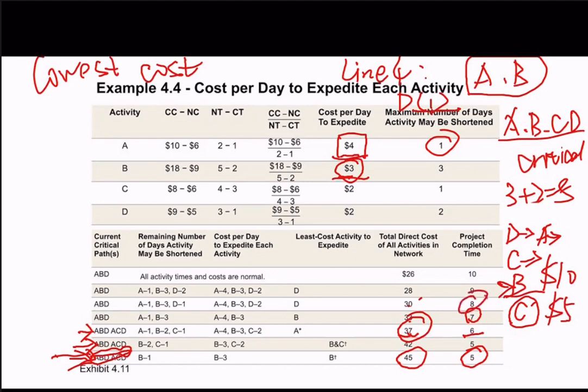But for the last few rows over there, the 7 does not exceed 8, the 6 is less than 8, so we do not have that part of the penalty cost over there. So the total cost, which means the total direct cost and total indirect cost, may change.